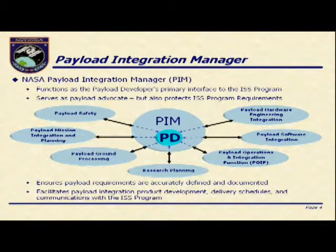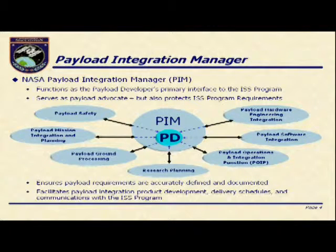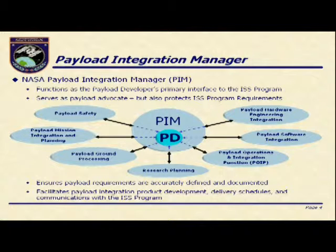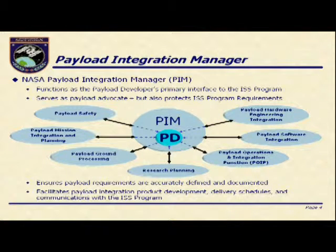The Payload Integration Manager is usually your first interface to the integration teams. Once you've made it onto a research plan and it's been baselined, that kicks off the rest of us to go do work. We have to make sure we understand what you need and how you'll fit with the rest of the payload activities and how we can integrate you on orbit. The PIM works with you every step of the way, working with payload safety, engineering, operations, software, and ground processing — to make sure you have somebody who understands all those things and can help you figure out the right thing to do.